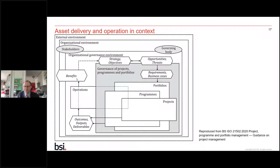So you need a sponsor who can work closely with the operator, ensure that the business really understands why it wants the project, give the requirements to the project manager or portfolio slash program manager, depending on the way the thing's set up, in order to be sure that the project really does deliver the thing the operator needs in order to deliver the benefits to the business. It's really good practice before the design work commences to define how the finished asset will fit into the system of which it's a part and how it will be operated.